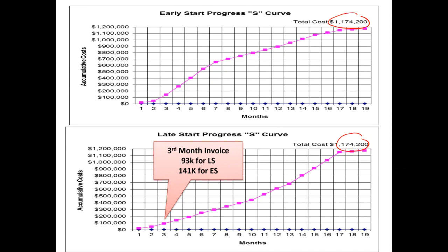So for instance, if we compare by end of third month, in a late start situation the clients have to pay 93,000, whereas their payment in case of an early start is 141,000 pounds. So there is a bit of a variation based on the constraints. One can see what suits different situations.